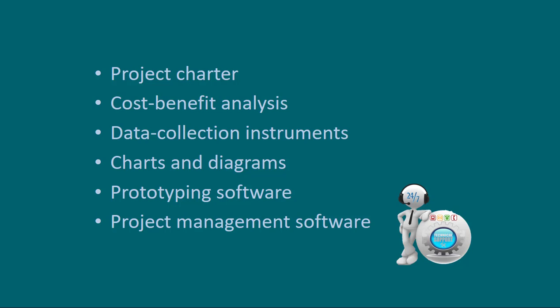In your cost benefit analysis, one other area that you're always going to make sure to look at is the payback period. This is the amount of time that it's going to take for a project's benefits to exceed the amount of costs that went into it. So you'll need to define what that payback period is. Your stakeholders are definitely going to want that information.